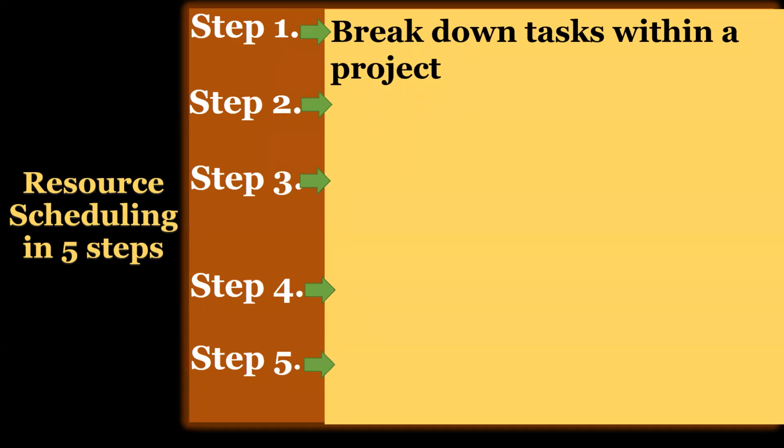Creating accurate estimates of how long each task will take is one of the hardest parts of resource scheduling. If team leaders don't have a way to track how long tasks have taken in the past, they may not have much to work on. That's why time tracking is such a valuable tool, as it provides insight into how long each task typically takes.